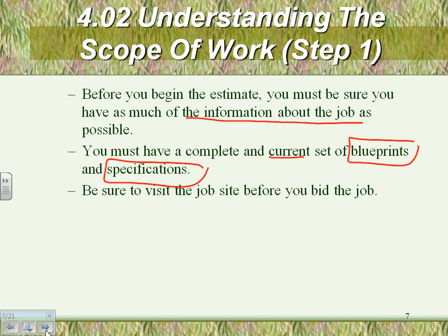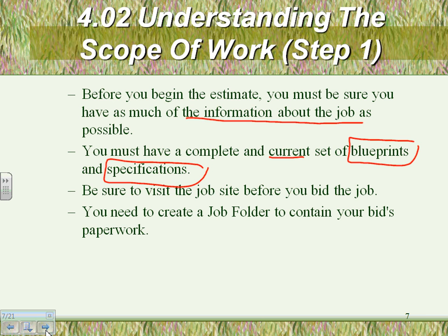The other one: be sure to visit the job site before you bid the job. It's a good idea, if you have the time, to drive around and see. Is this downtown Minneapolis, where your electricians are going to spend half an hour trying to find a place to park?